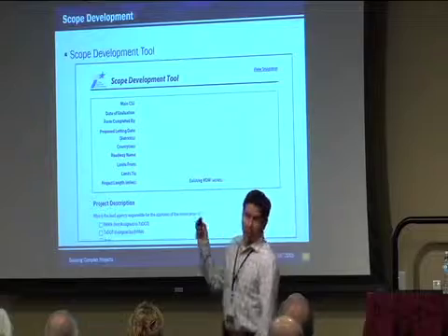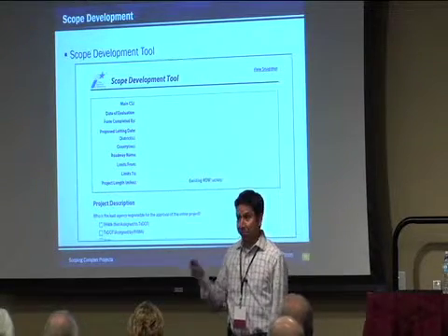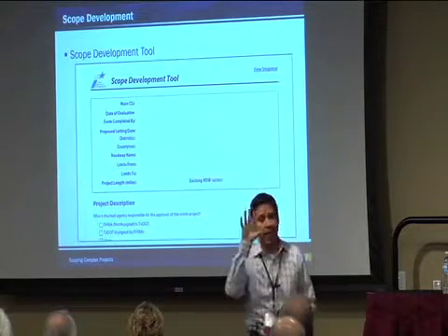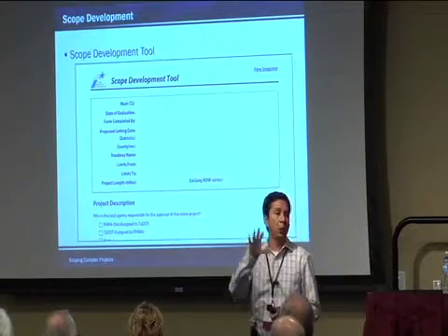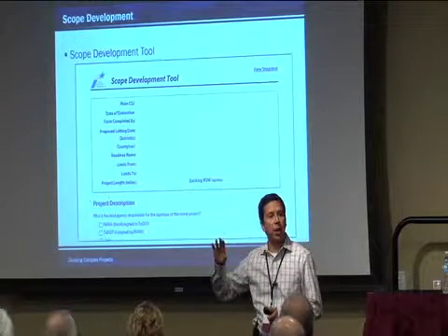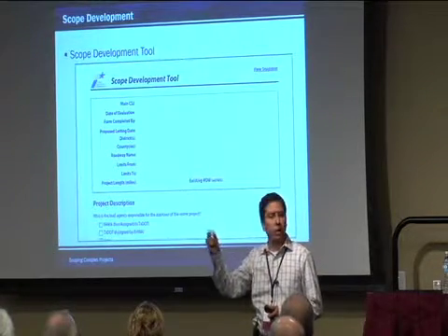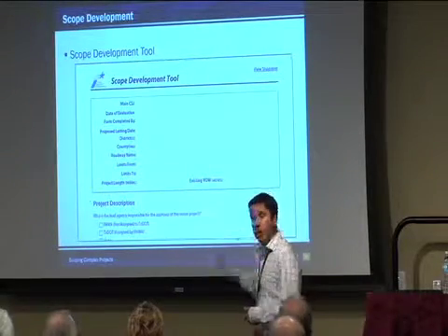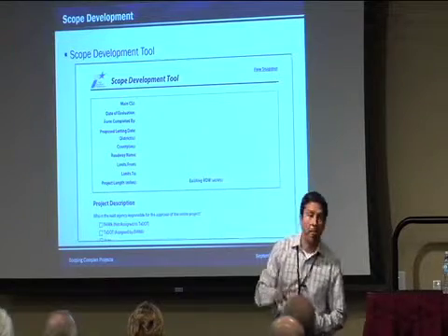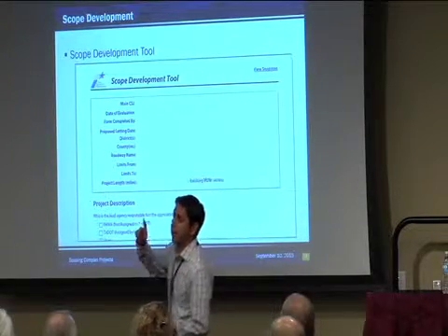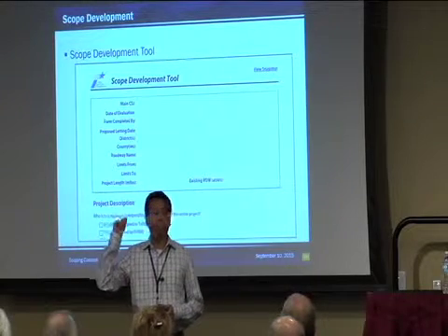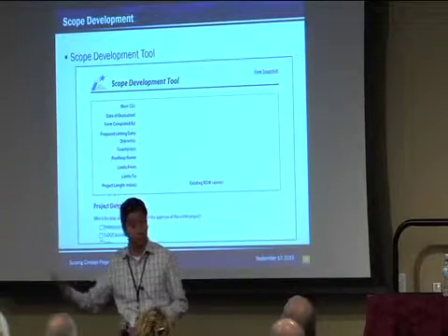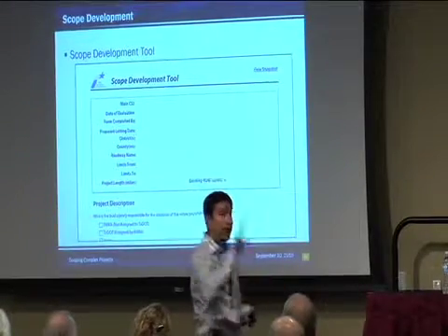Scope development tool. This is our smart form that we're using right now, and it is a great tool. Basically it outlines all the information you know early on with your first initial knowledge of the project, some of those initial constraints that maybe the consultants or the district team have identified. And this tool will shoot out what exactly needs to be done. Another benefit is that it identifies what does not need to be done. It gives you a negative statement on certain aspects that we can eliminate right now at scoping, and we have it documented in our file.